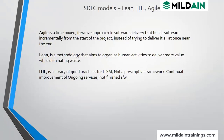They work in a sprint and deliver the software to the operations team. For example, if an application to be developed has four features, the first feature is covered in the first sprint. When covered and done they integrate the complete features and give to the operations team. After the sprint they have a complete presentation and do root cause analysis — studying new learnings and how to implement them in the second sprint. This is the agile mode of working.